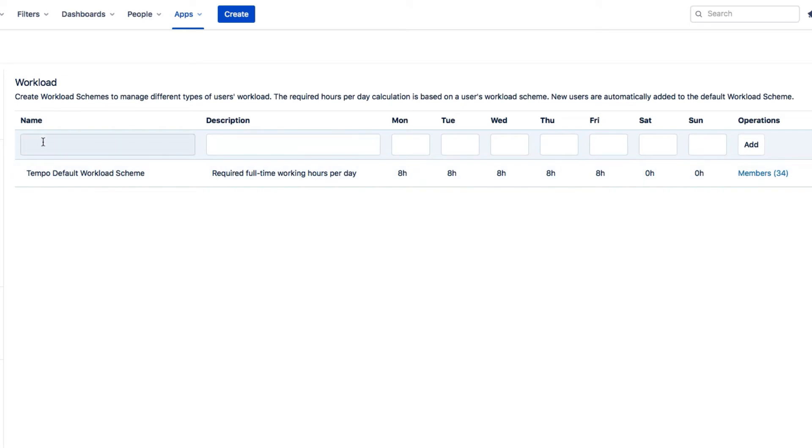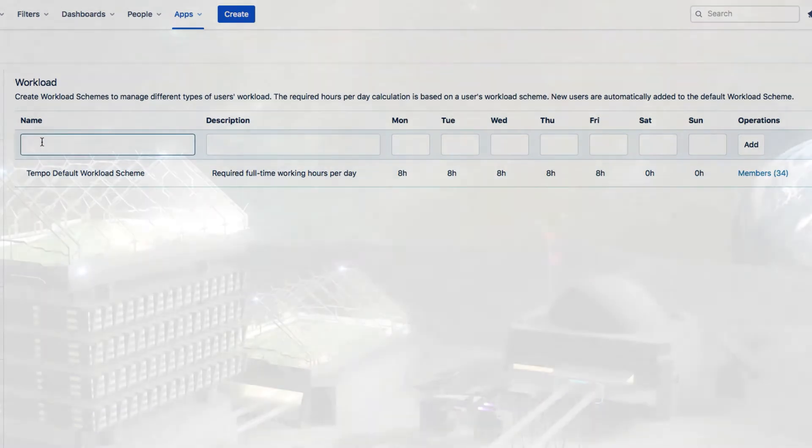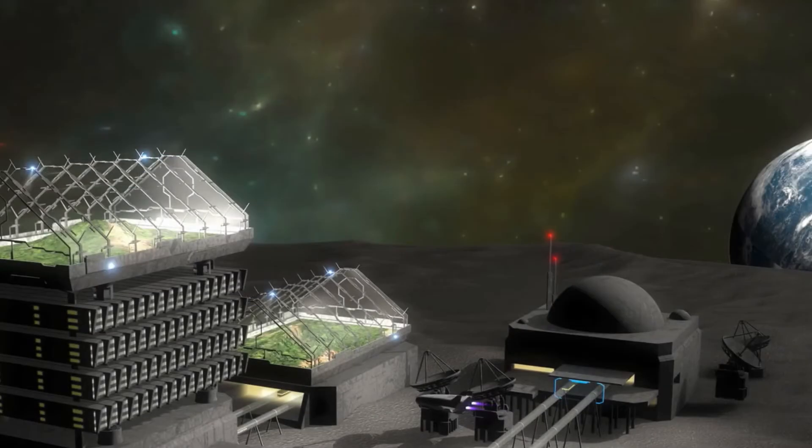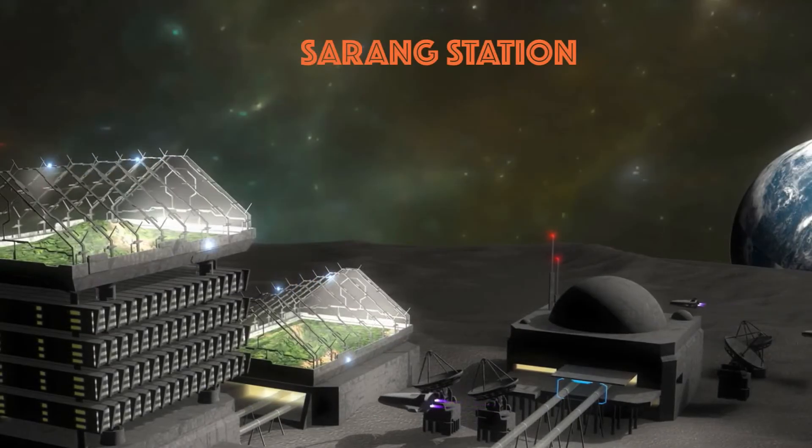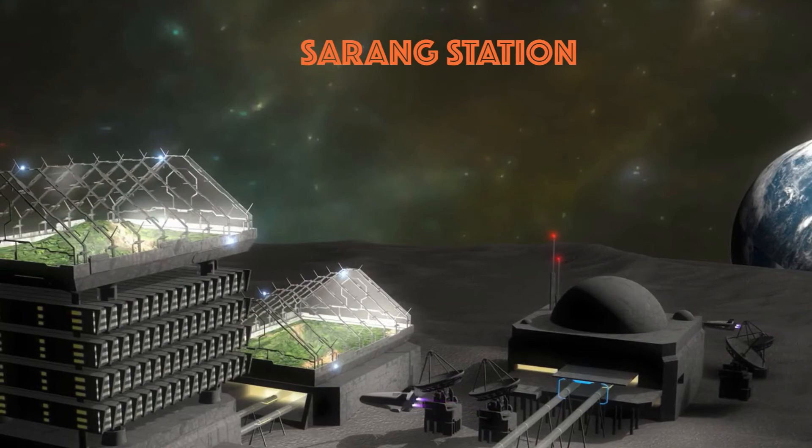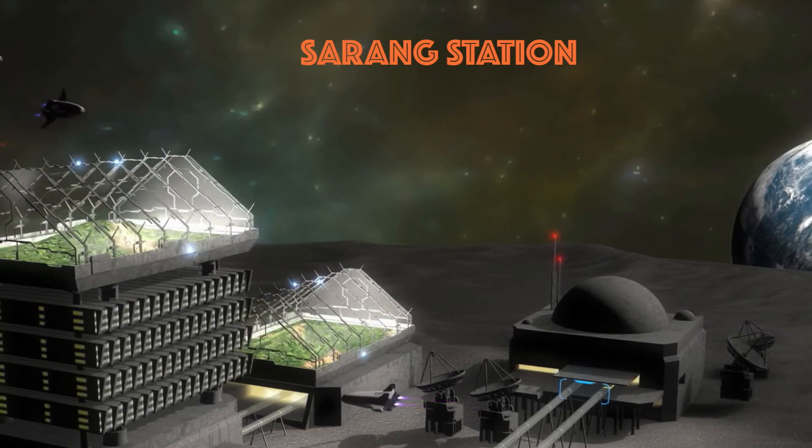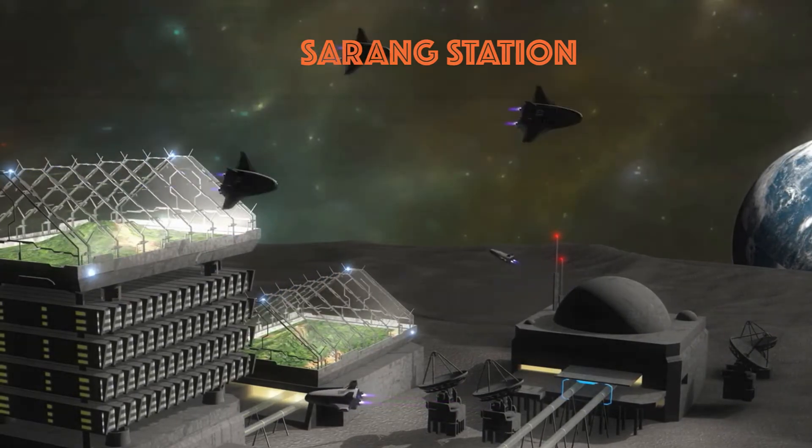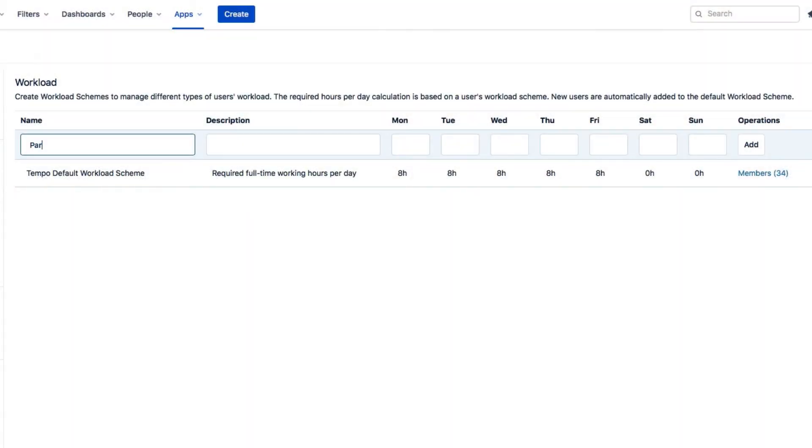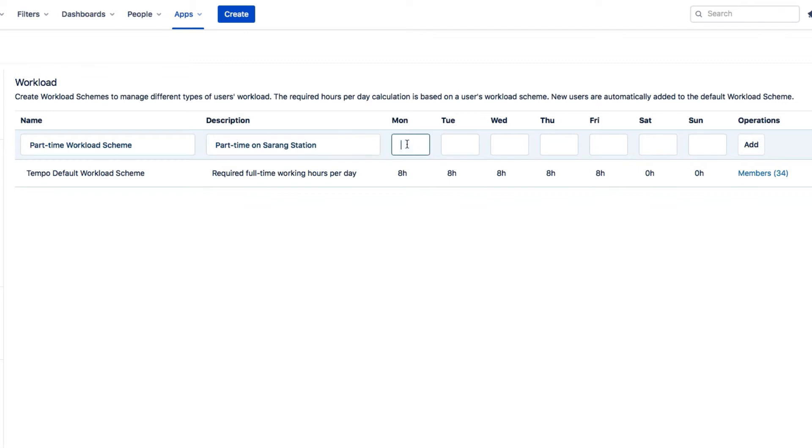However, I'm not off the hook. Some employees here at Lunar Industries work part-time on the moon. So I'll create a scheme just for them. I'll call it Part-Time Workload Scheme, and add a little description. And I'll enter 4 hours per day, Monday to Friday, and add that scheme.